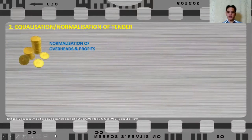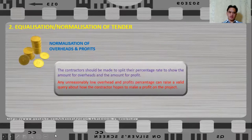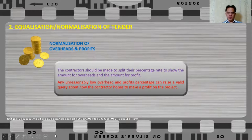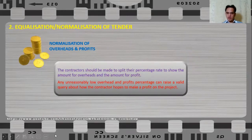Now let us talk about the normalization of overheads and profits. The contractor should be made to split their percentage rate to show the amount of overheads and the amount of profit separately. Any unreasonably low overhead and profit percentage can raise a valid query about how the contractor hopes to make a profit on the project. Remember, a low profit margin submitted by the contractor is not always good — the contractor has to explain why the profit is at that level.